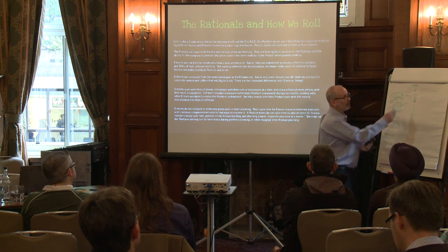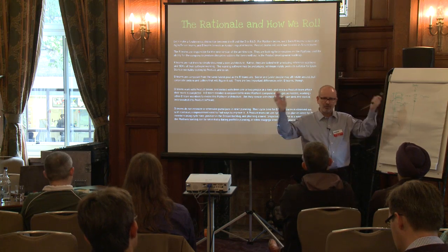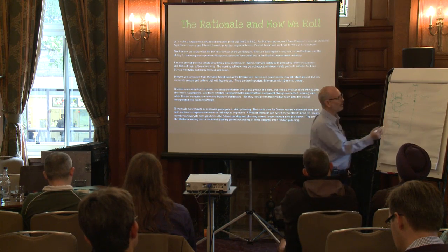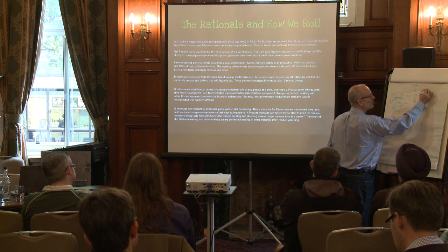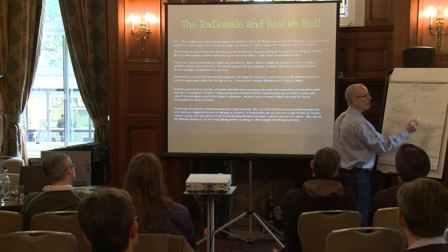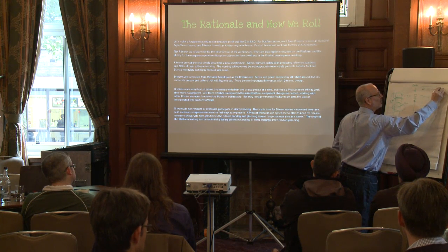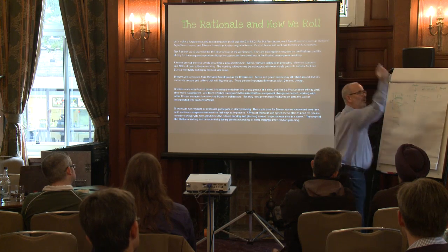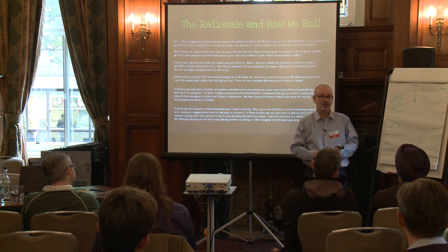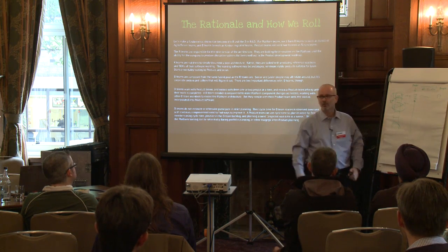Okay? And then as they move through, we have various stages, depending on whatever the team needs to work with. They may have some process internally that they have reviews or whatever. I don't care. They'll work through it. When they're finally done, they get accepted when the product team that they're embedded with has a story that they're working on that's accepted. All right? And then they can come back and look for the next ready thing.